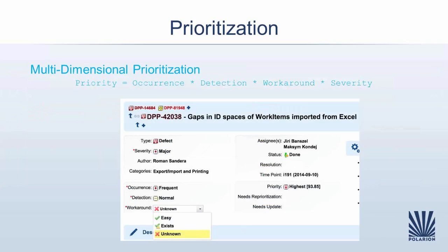The same approach was not applicable for issues or defects. Often it would cost more time to analyze and order each issue than to fix it. But still, we wanted to be sure that the budget is invested in the most efficient way. We tried to understand how he would order the issues if he would do the analysis. We searched for some patterns to make the prioritization easier. We ended up with a multi-dimensional prioritization schema.